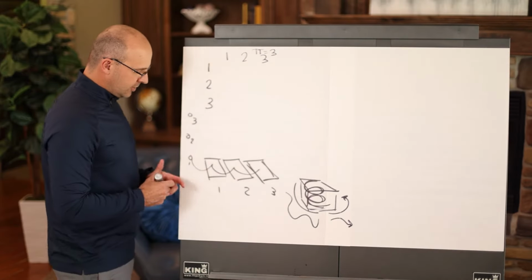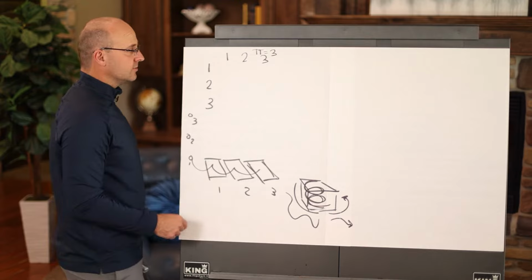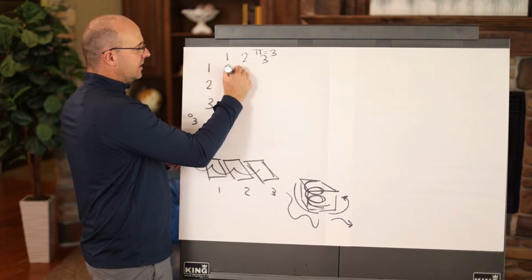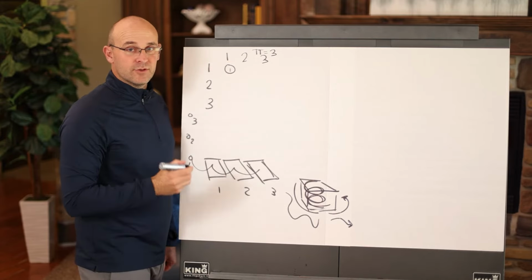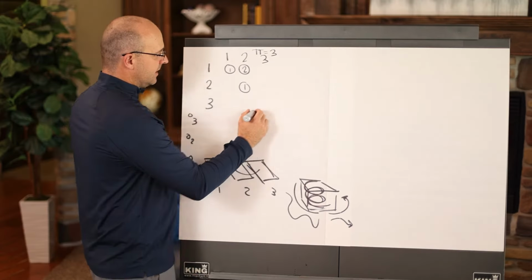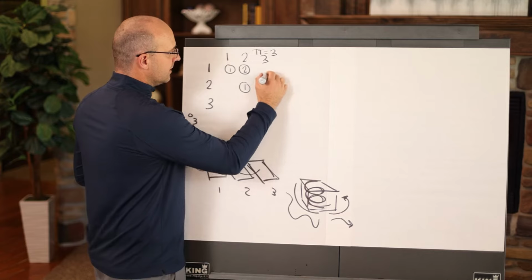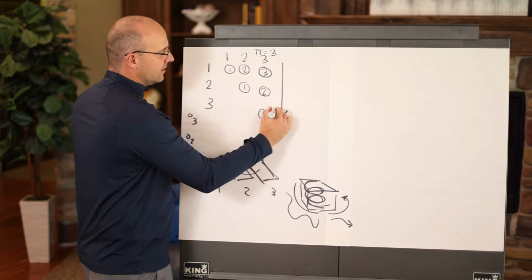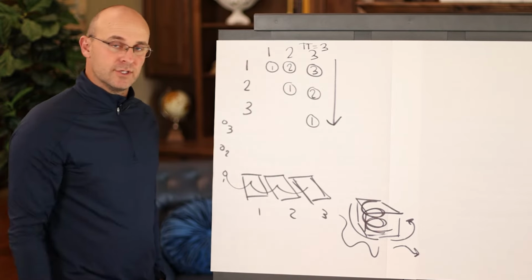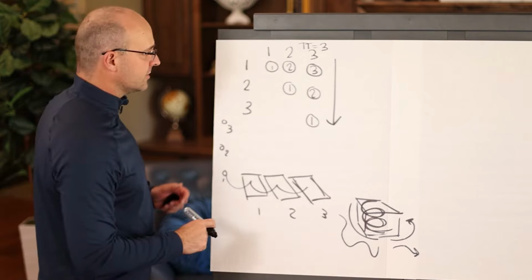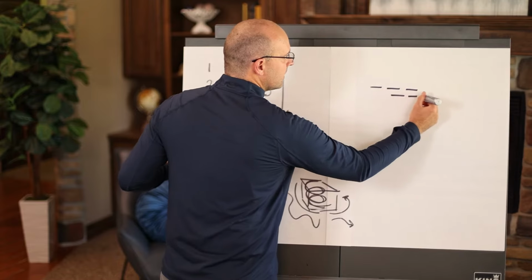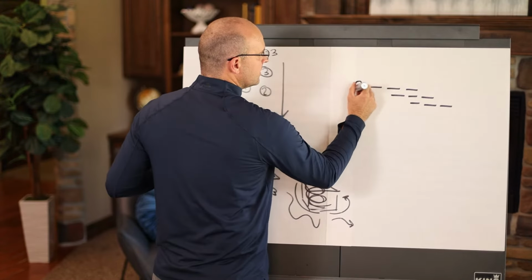When you look at this, just like we see the trades going through the zones, you're seeing the trade come through the zones. So this right here, takt time number 1, would show the first crew here. Then it would show the crew in takt time number 2, the crews being there. Then in the third takt time, it would show it like this. And all you're seeing is that train running down the page along these zones, just like it is going through the zones specifically in the field in construction. And so if you ever see a takt plan, it should look like this, okay? And you would see the zones again on the left.